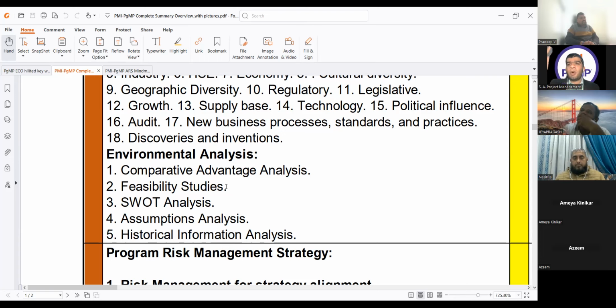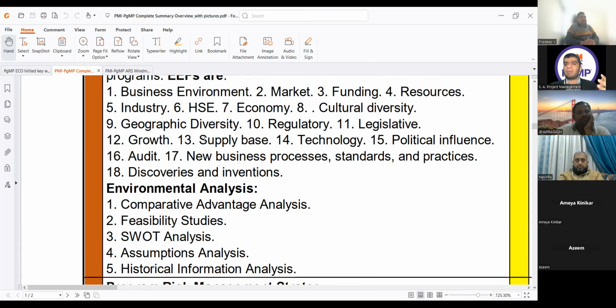In some hilly or mountain areas, maybe the water is enough, but you can only work maybe 2 months in the whole year because of the snow. So this is not geographically feasible. In this case, I will never opt for a program which is not feasible from the current perspectives. Understood? This is feasibility analysis. You have to analyze a lot of things and then you decide, okay, I go for this program because everything is feasible for the geography, economy, and business environment, and it will ultimately support the organizational objectives. This is feasibility analysis study.